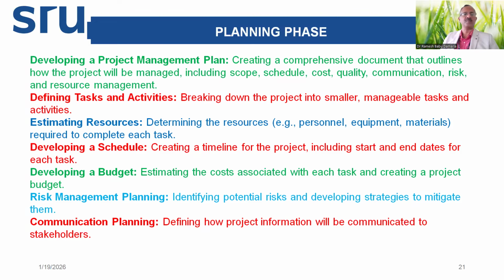allocating to different teams. So electrical work is assigned to the electrical team, painting work is assigned to a painting team, wood work is assigned to a carpenter's team, steel work is assigned to a specialized team who makes the steel structure, cement work is assigned to a team who can do a good cementing job. Then at this phase, we also estimate the resources, like how much materials are required, what kind of equipment is required, how many people are required, skilled, semi-skilled, and unskilled. All that is done in this phase.